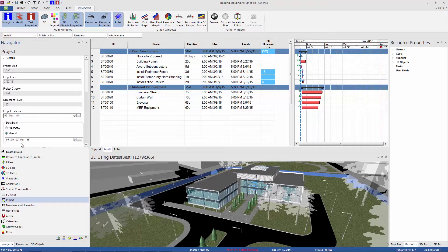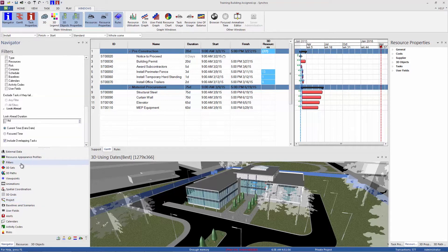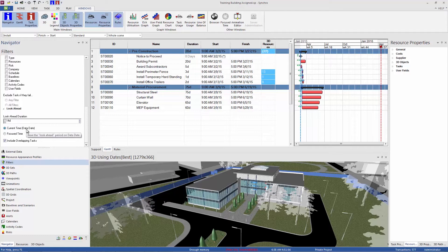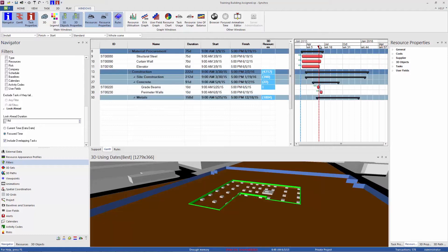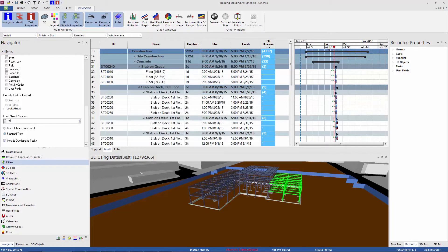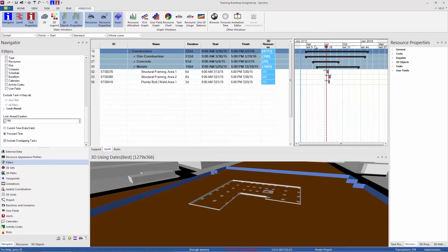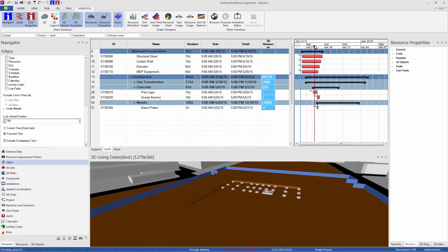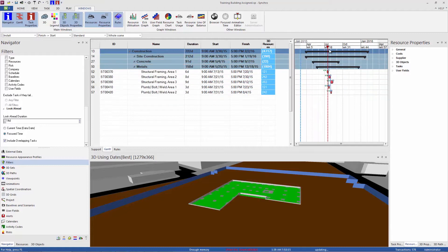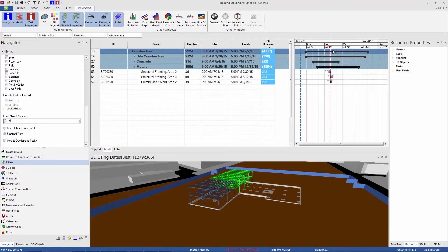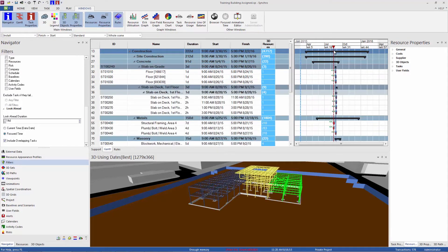Another thing you can do with the two-week look ahead filter is change this from data date to focus time. And the focus time is this red dashed line. So I can move this by left-clicking anywhere in the timeline at the top of the Gantt chart, and now I'm looking at two weeks from that date. So we can scroll this through the schedule to look at any particular two weeks at a time.